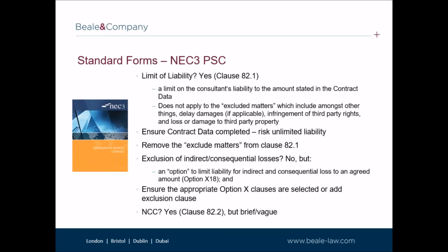In relation to indirect and consequential losses, there is some confusion amongst consultants on whether such losses are excluded under the NEC 3 PSC. Pursuant to option X18, a consultant can limit liability for indirect and consequential losses to an agreed amount to be stated in the contract data. As above, if this option is selected and no amount is selected, liability is unlimited.